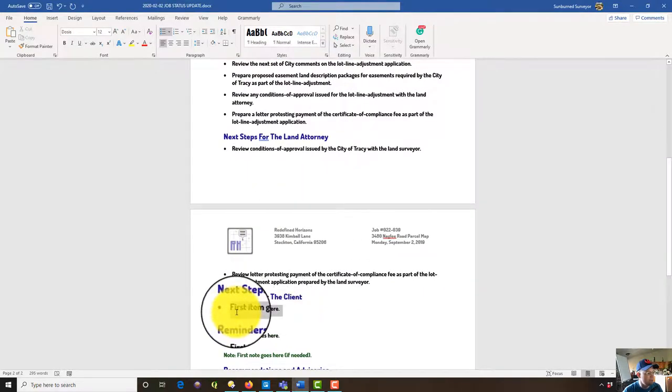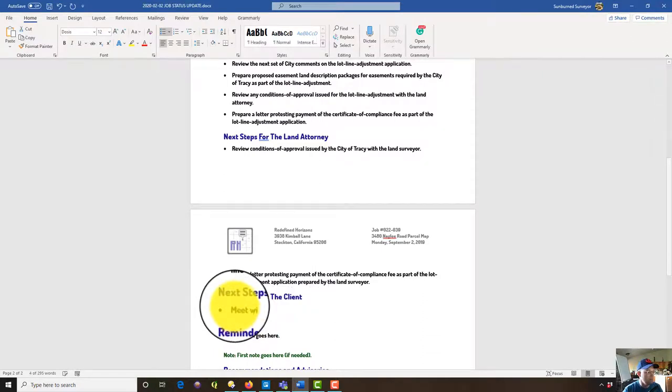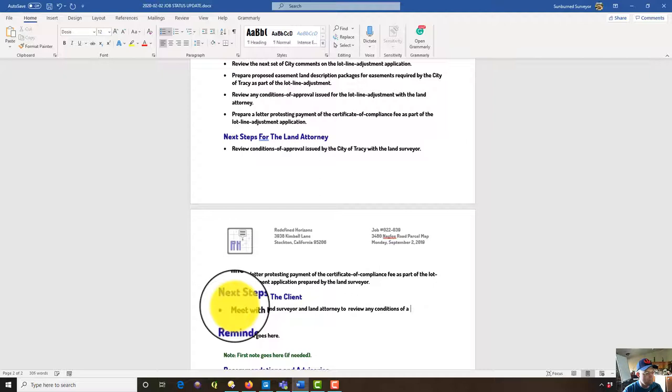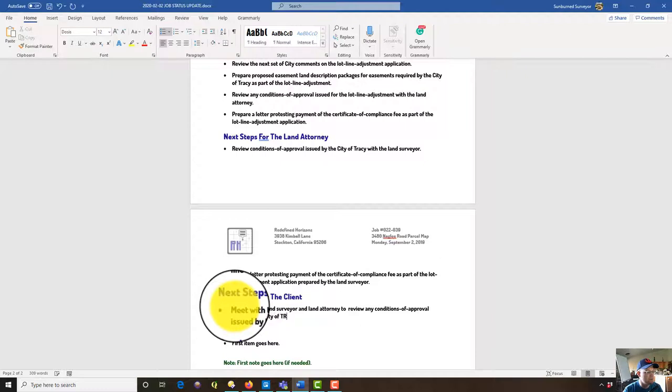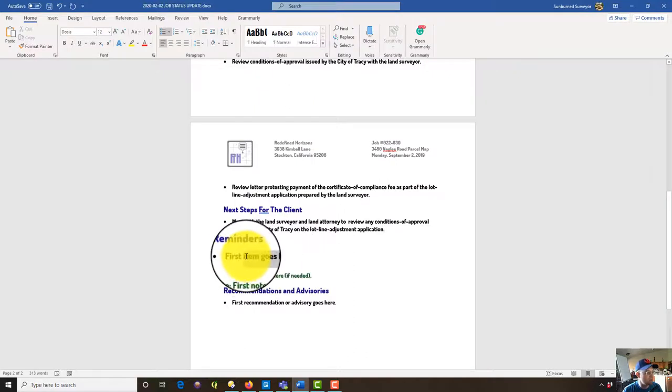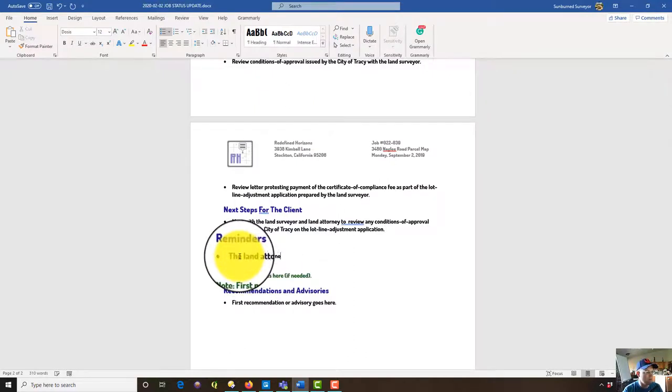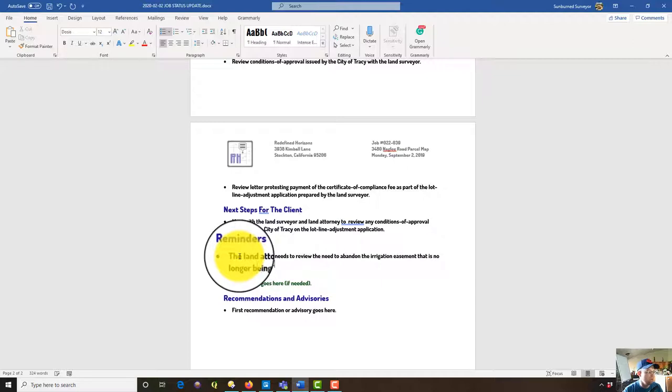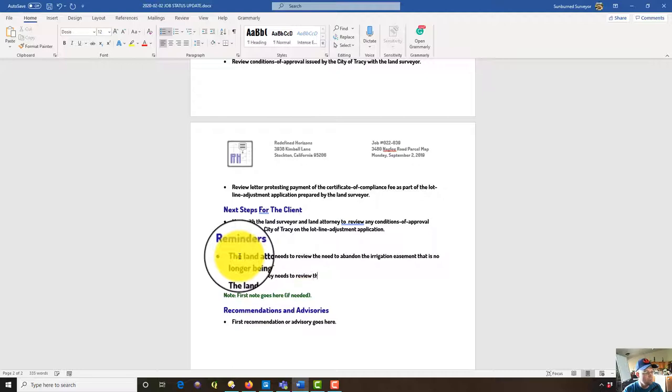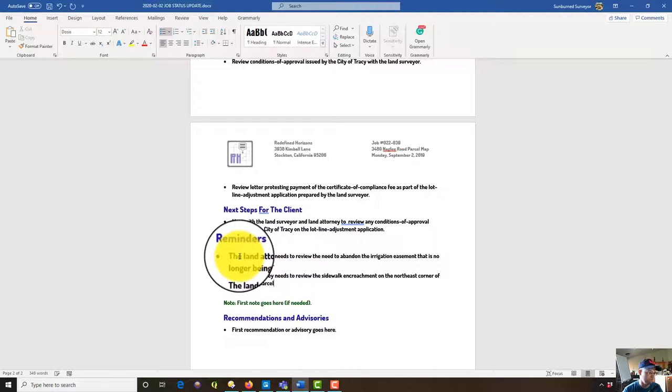So next steps for the client are going to be meet with the land surveyor and land attorney to review any conditions of approval issued by the city of Tracy on the lotline adjustment application. Okay, so then I got a couple reminders that we're going to put here. Land attorney needs to review the need to abandon irrigation easement that is no longer being used. Land attorney needs to review sidewalk encroachment northeast corner of the subject parcels and discuss remedies with the land surveyor.